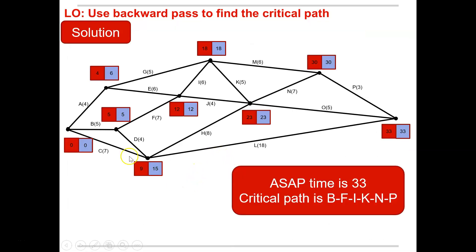Alright, so here's the solution. Your network should look something like this with your forwards and backwards path completed and you could use the forwards and backwards path to find that your critical path or your ASAP time is B, F, I, K and P. And if any of these activities here were delayed, the whole path, the whole project would be delayed. It's important to note that in each of your examples.